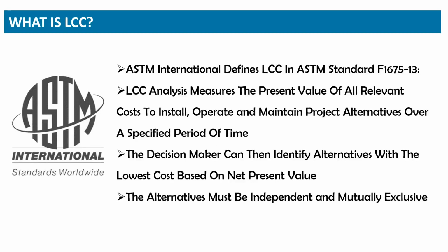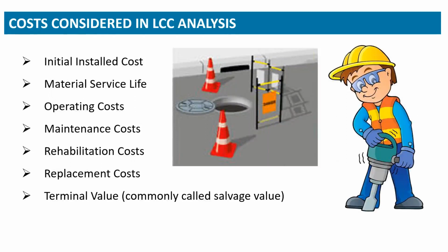And then you've got that business tool, that business decision tool, in a way that's defined by experts as being reliable to in turn rely upon in your decision making. Bear in mind the last point, broadly speaking, of the ASTM standard for life cycle analysis being conducted, and that is when you pick your alternatives, they've got to be independent of one another and mutually exclusive of one another. The costs, well, in a way, they're pretty predictable.